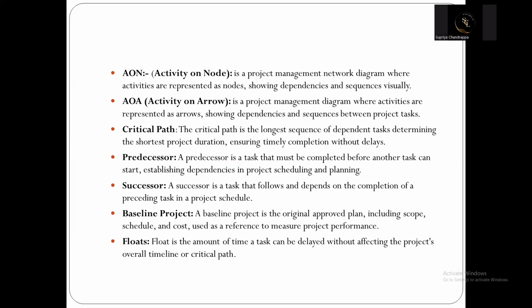Coming to predecessor and successor: a predecessor is a task that must be completed before another task can start, and a successor is a task that follows and depends on the completion of a preceding task in the project schedule. For example, for substructure, superstructure is a successor. For superstructure, substructure is a predecessor.